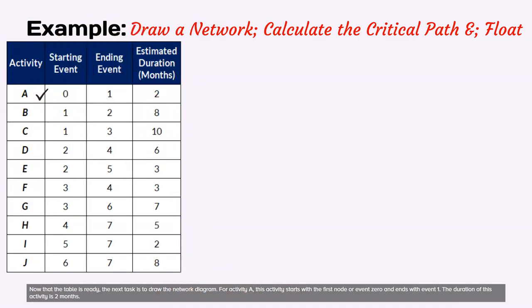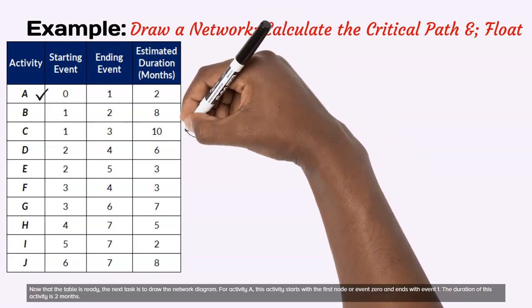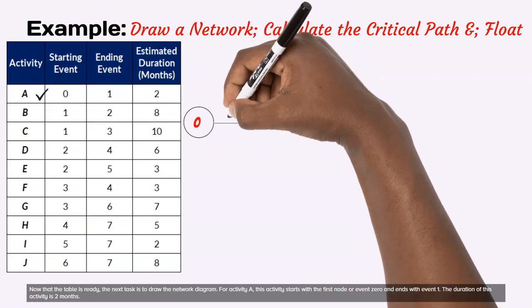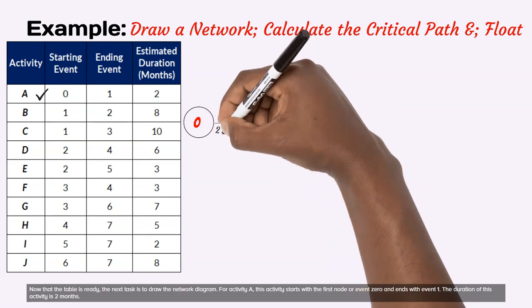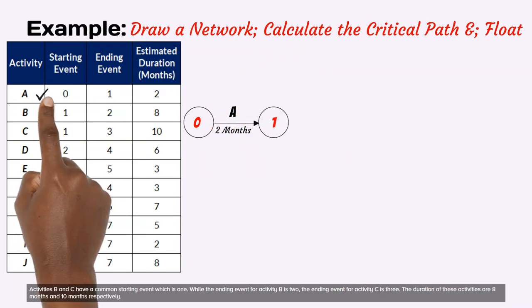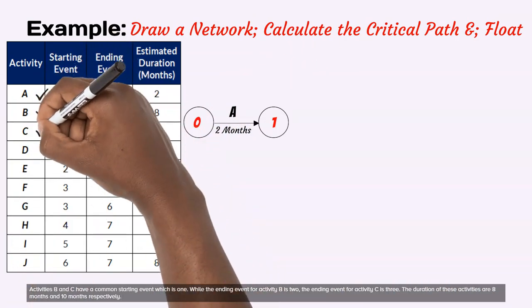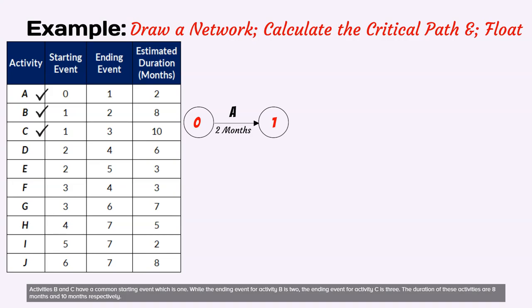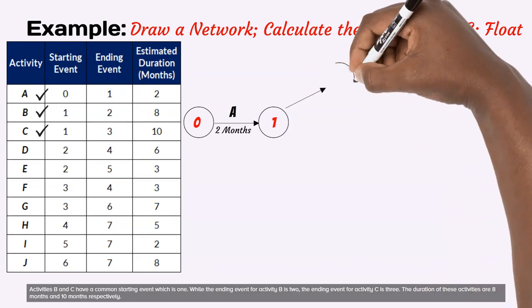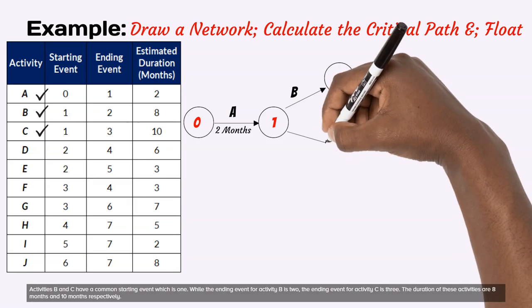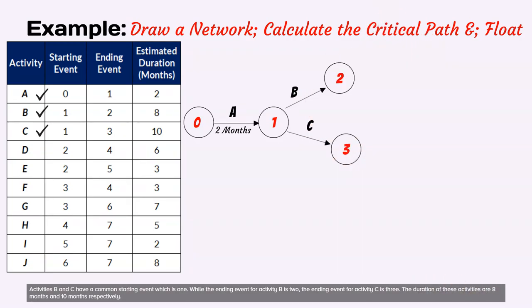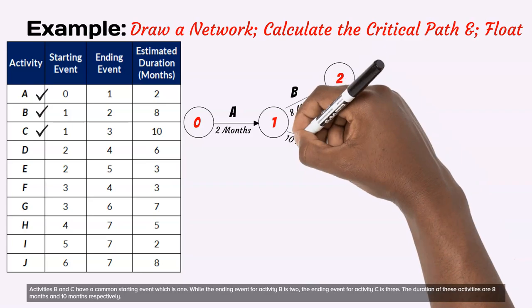For activity A, this activity starts with the first node or event 0 and ends with event 1. The duration of this activity is 2 months. Activities B and C have a common starting event which is 1. While the ending event for activity B is 2, the ending event for activity C is 3. The duration of these activities are 8 months and 10 months respectively.